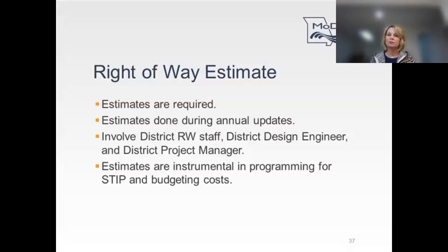This could be due to the delays in proper scoping, last-minute changes to a project, lack of communication between design and planning, or not involving the right-of-way staff in determining costs associated with the projects. Because of the overages in programming, MoDOT has left a lot of money on the table over the last few STIP cycles, which could have been used for additional projects.